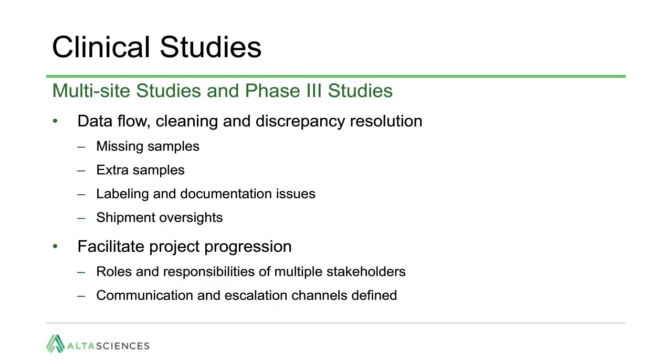For these clinical studies, there is the data flow, the data cleaning, discrepancy resolution to manage between multiple stakeholders. There can be missing samples or extra samples at the laboratory or in the database, labeling and documentation issues, and shipment oversights. While there are many stakeholders, many of the queries and issues make it to the responsible bioanalytical scientist. To facilitate project progression at the initiation of the project or program, the roles and responsibilities of the key stakeholders should be defined in addition to communication and escalation channels.